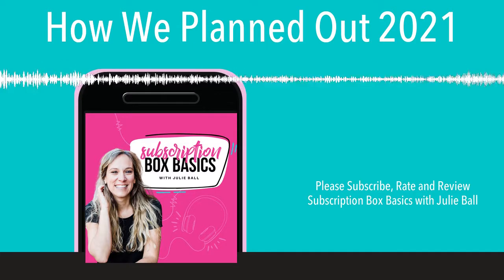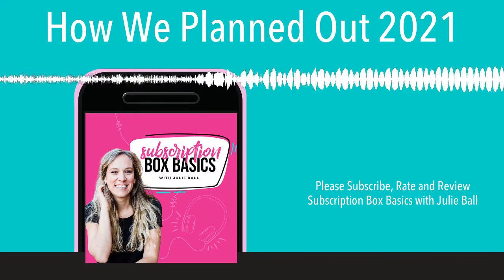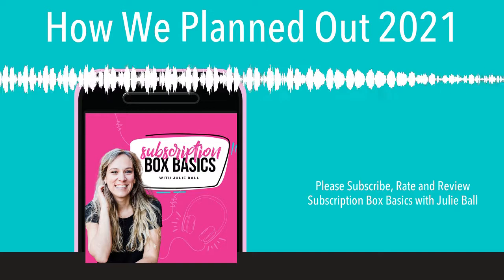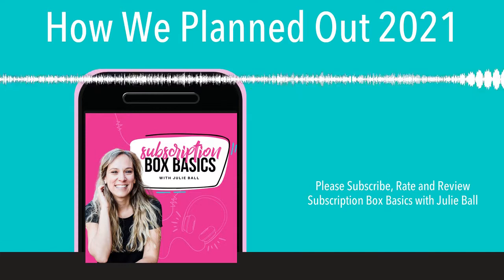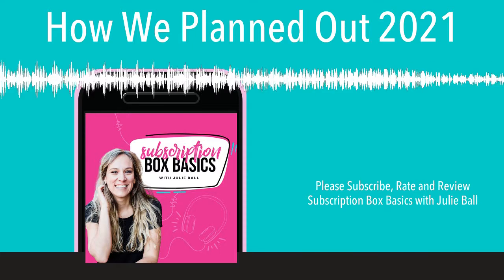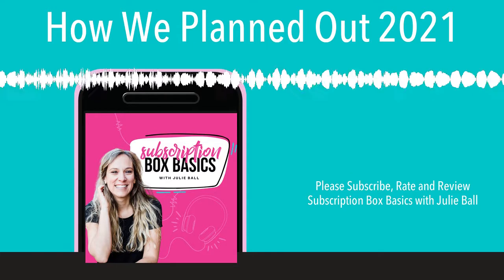So then after everything's in the project management software and is assigned to me, I get to work sourcing the products. And what's really cool about planning out 2021 in advance like this is that we were able to narrow it down to fewer vendors than in the past, and we're able to commit to larger orders for them. So for example, say I'm going to buy 4 books from one publisher. I can commit to them over the year of 2021. I'm going to buy X amount of books over these months. We can plan it further in advance.